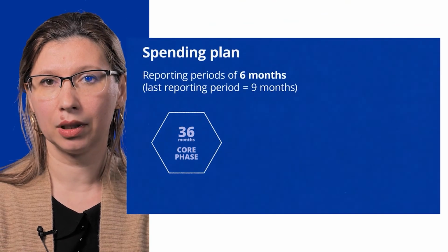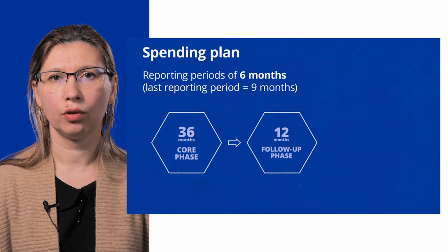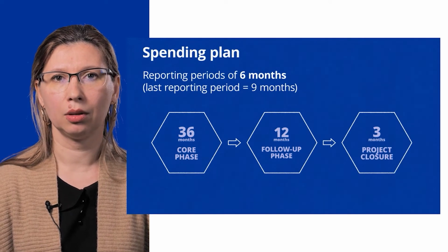Your spending plan depends on the activity plans in the application form. If an activity is carried out close to the end of the reporting period, the related payment may only be possible in the next semester. The costs should therefore be budgeted in the following reporting period.